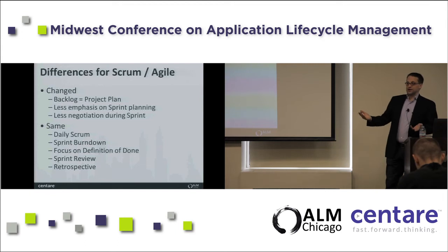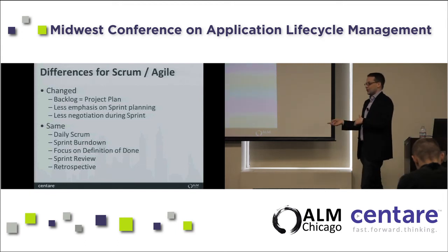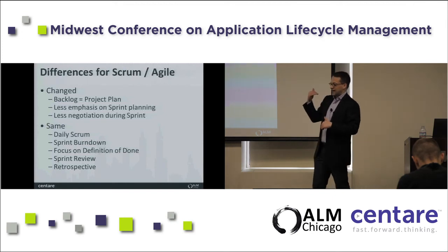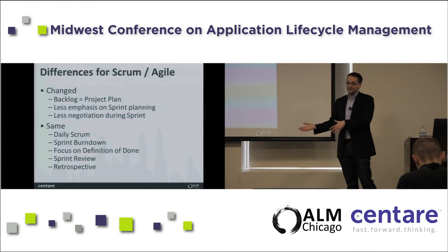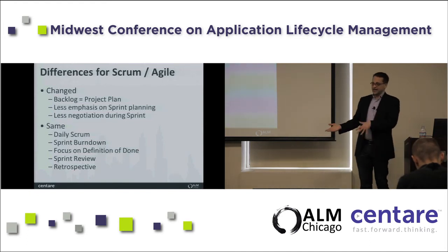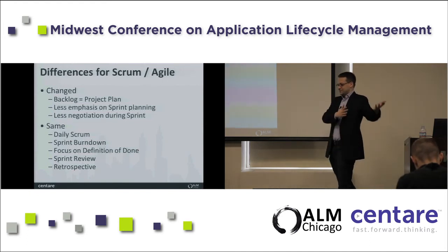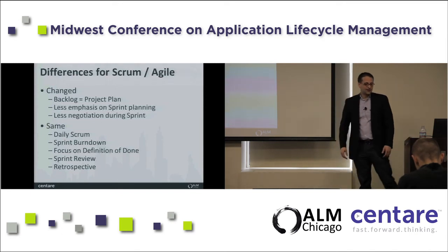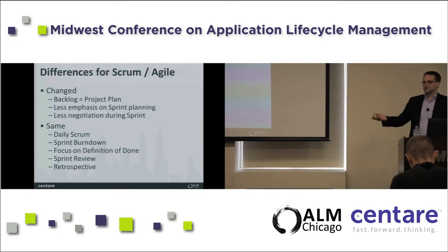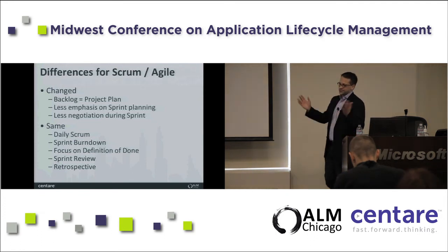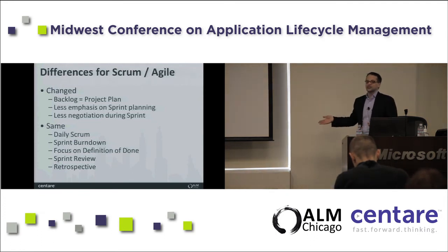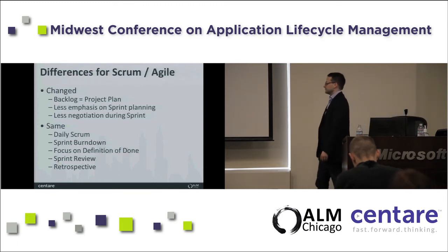A lot of times in that project plan, the tasks have been decomposed way ahead of time. So the how are you going to achieve the sprint goal stuff that would happen in the second half of the sprint planning meeting, we're not doing that so much anymore because it's done ahead of time. Unless you choose to decompose the user stories or PBIs during it, but we're in fairly uncharted territory anyway because it's just such an uncomfortable union of those two processes.